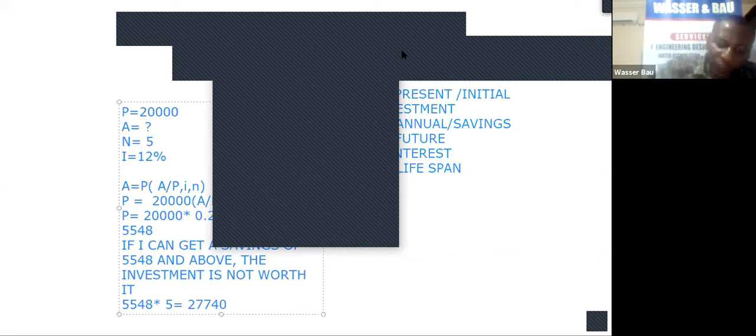And inflation is 15% per annum. So instead of this project being 10 billion, after 1 year the project should be worth 11 billion. At 10%, after 2 years, this project is 12 billion. So if the project is awarded today, and I'm bidding for it, and the state government says the project will finish in 2 years, we will pay you in 2 years, even if the cost of the project is 10 billion, I will quote 12 billion.